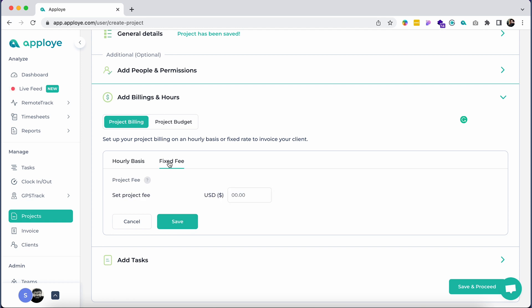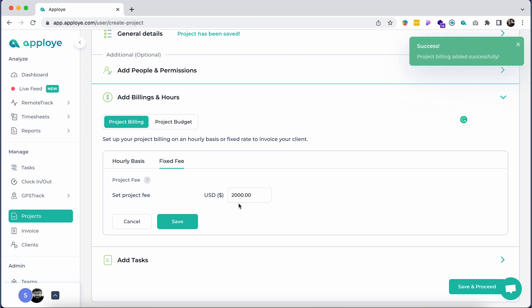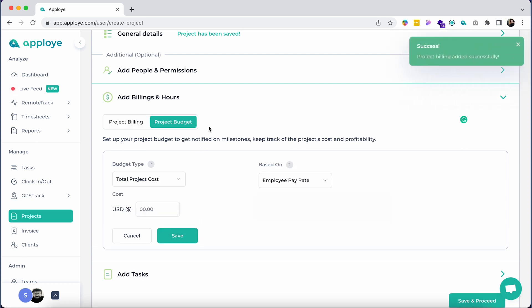In case you would like to invoice your client a fixed fee for the entire project, you can also do that by choosing the fixed fee option. Set a project budget to keep track of the project's cost and profitability.